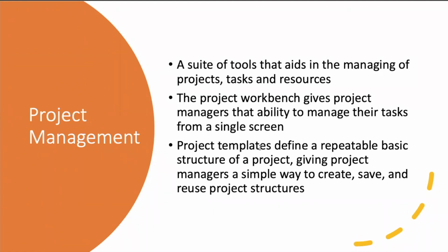You can only import, and I believe it's up to 12 fields from Microsoft Project. And I think Orlando's at maybe 20 now. But you look at some of these big clients, and their Microsoft Project is built out to include like 50 or 60 rows, and they're tracking everything from time of day to sun angle to all this crazy stuff about projects that don't make their way into ServiceNow. And a lot of clients are very surprised by that, especially early on.